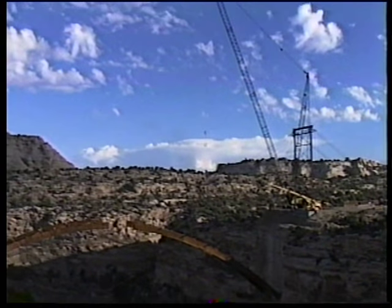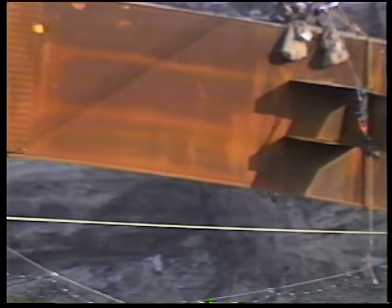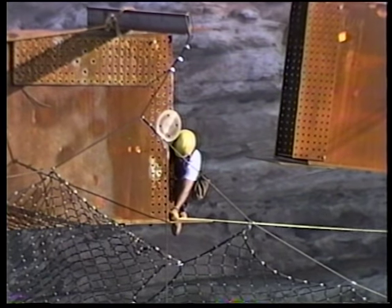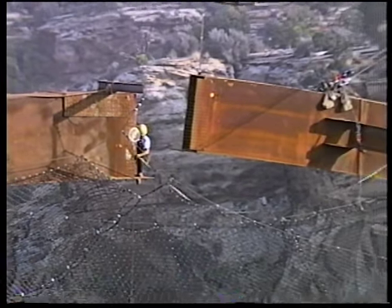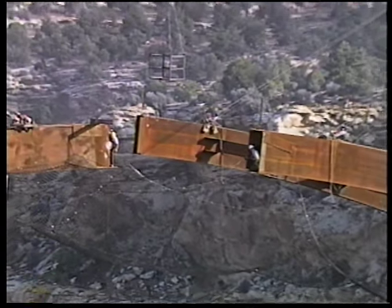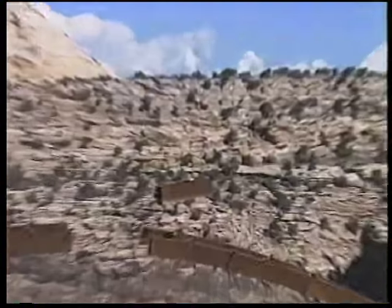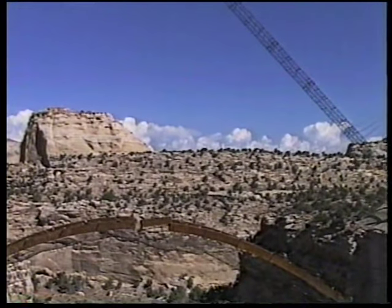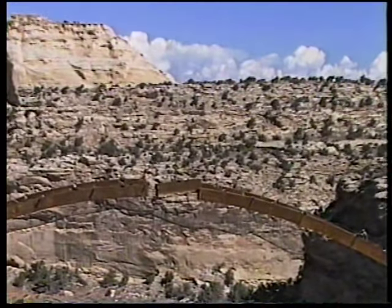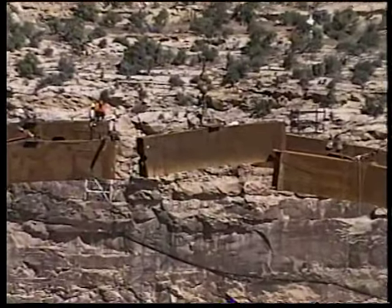With the bridge structure finished and ready for the concrete contractor to start the deck, Jake's team looked back on all that was accomplished. Rather than setting up cableways over the rugged 500-foot wide canyon, Jake's engineers chose to have the arch sections swung into place. Rather than supporting the arches from stationary towers as they grew toward the center, luffing towers were employed. First, the closer sections were placed by an American 9310 crane configured as a skyhorse. Then the crane was reconfigured as a guy horse to boom the 30,000-pound sections out as far as 273 feet.